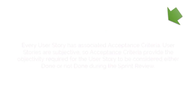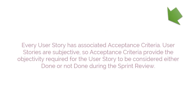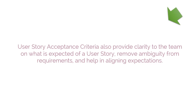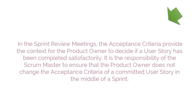User Story Acceptance Criteria. Every user story has associated acceptance criteria. User stories are subjective, so acceptance criteria provide the objectivity required for the user story to be considered either done or not done during the sprint review. User story acceptance criteria also provide clarity to the team on what is expected of a user story, remove ambiguity from requirements, and help in aligning expectations. In the sprint review meetings, the acceptance criteria provide the context for the product owner to decide if a user story has been completed satisfactorily. It is the responsibility of a scrum master to ensure that the product owner does not change the acceptance criteria of a committed user story in the middle of a sprint.